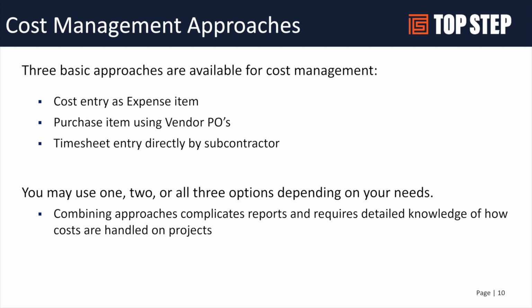Also, OpenAir does have a purchasing module. It is basically meant for tracking vendor costs that are not based on hours. So you may outsource work to your vendor, and they may fixed fee that work. In that scenario, you don't need them to log into OpenAir and enter time because you're not paying them for the time and you're not costing the project based on the time. So in that scenario, you could create a vendor PO or purchase item in the purchase module.